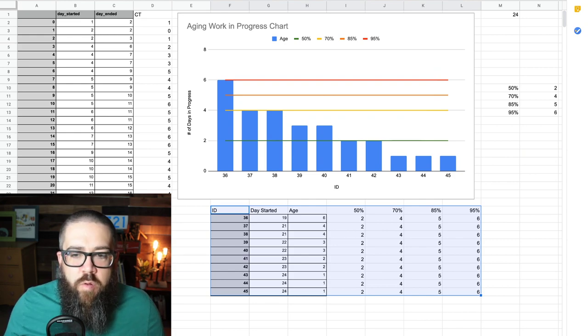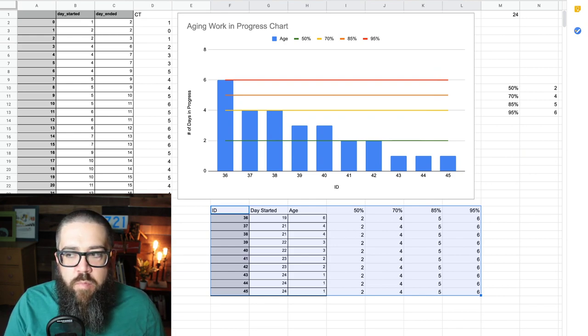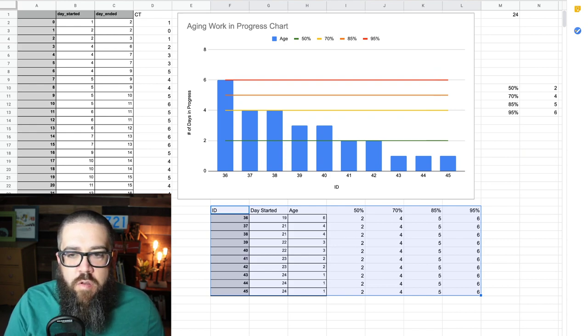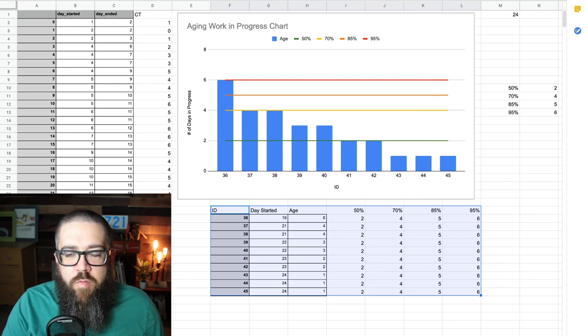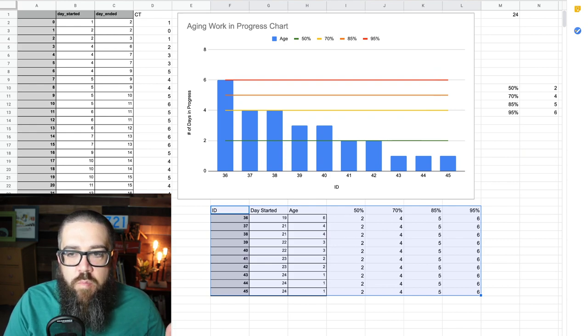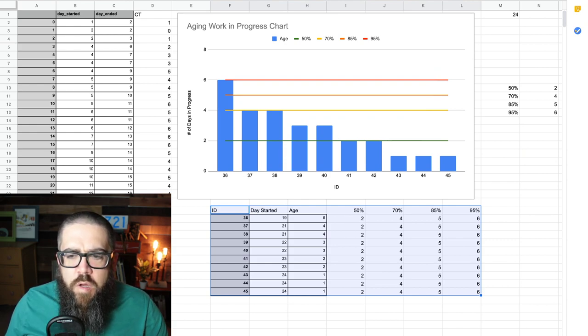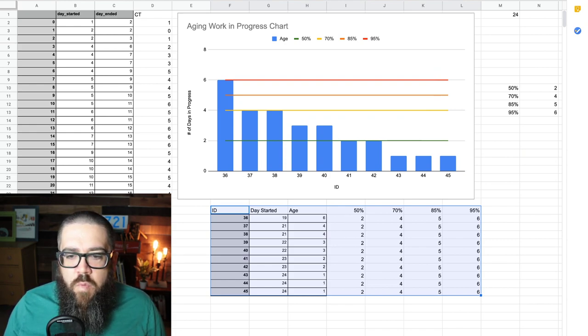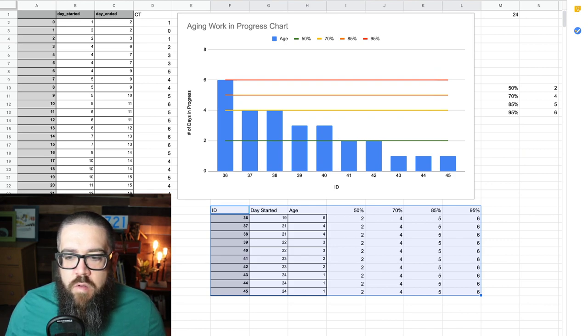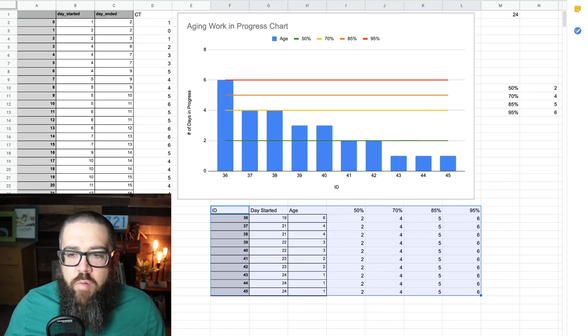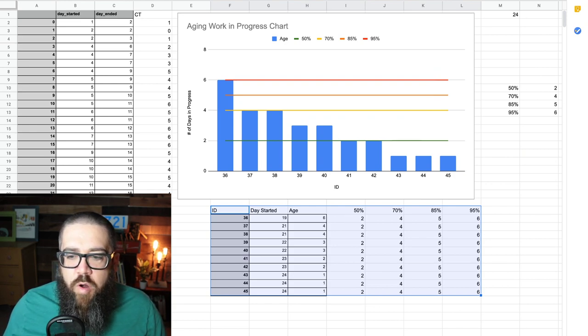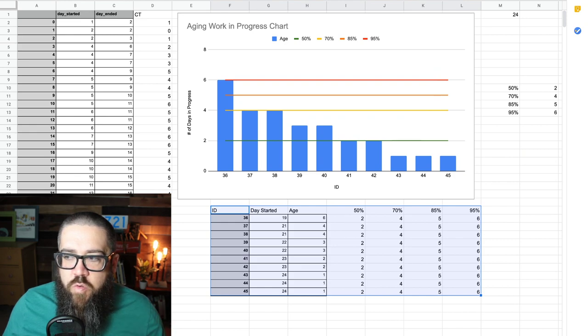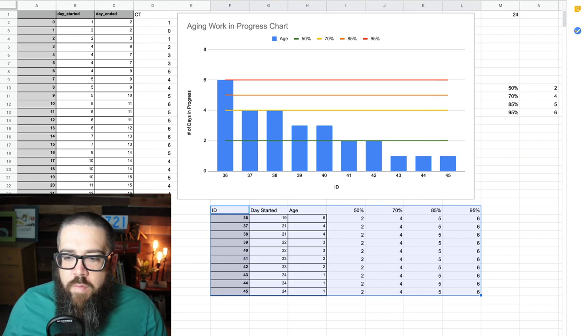And you can build things like cycle time, scatter plots, throughput graphs, and of course, the graph we're going to talk about tonight, which is the aging work in progress chart. So for basic aging work in progress chart, all you need is the day that the item started and that will get you the blue bars. So if you look, you see items 36 through 45 and the day that they started.